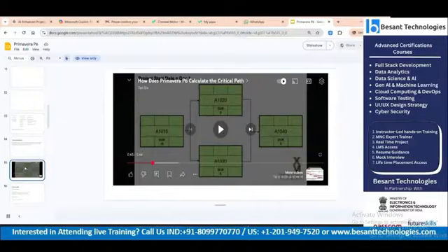If the activity is not happening as per the planned timeline, it is getting delayed and started 2 days later. Technically, the duration of the activity is 3 days. If it is delayed by 2 days, the delay will be carried forward to the upcoming activity. This is the common thing, right?